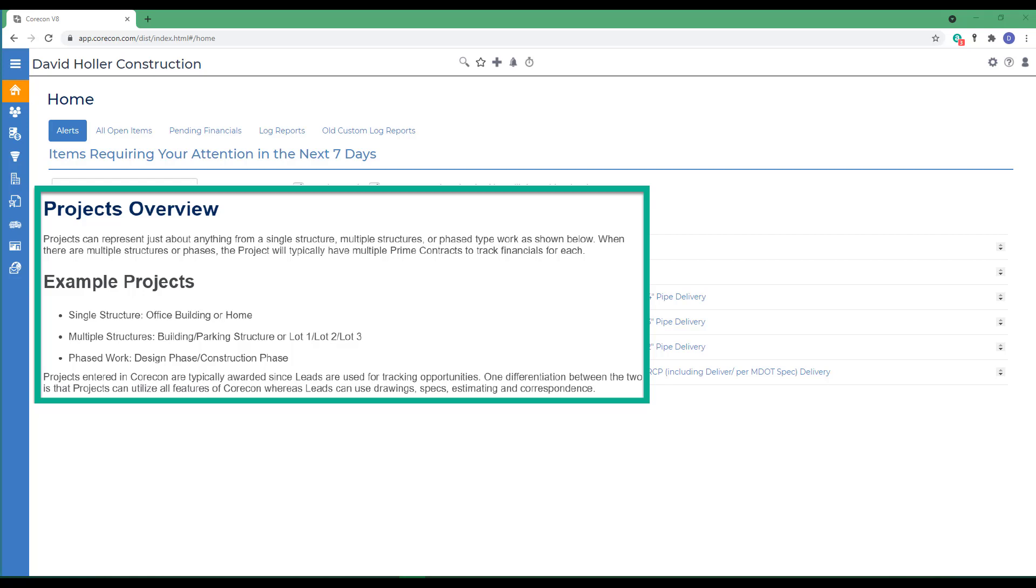Also, phased work can be tracked under a single project. For example, there may be a design phase representing the first prime contract, and then a construction phase represented by a second prime contract.